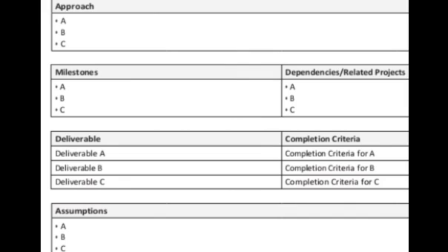How long is it going to take for you to dig that foundation of the house? Maybe you say, okay, digging of the foundation is going to take 1 week, which is 7 days. So which means your first milestone for that project is 7 days, which is 1 week. So in 7 days, you are saying you are going to be delivering on what? The foundation of that house. So that 7 days is what? Your first milestone. Now the second milestone could be, okay, the raising of the blocks of the house to the roofing level. Understand? How long is it going to take for you to raise the blocks of the house to the roofing level? Let's say, for instance, you say, okay, that is going to take 2 weeks. So which means your second milestone is what?